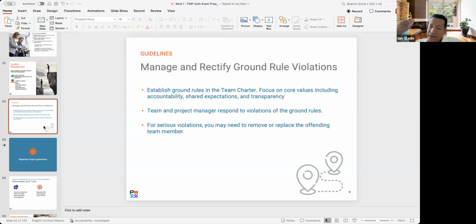So you do that for every stakeholder. What's your non-negotiable? What's the aspirational? Floor, ceiling. You go around and you do that, and then you look at where the floors are different, where the non-negotiables are not aligned, and you focus on rectifying that. Once you can rectify the non-negotiables and see if you can adjust and negotiate, then the ceiling is no longer an issue. So in the case of Stanford v. Adobe,